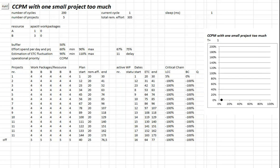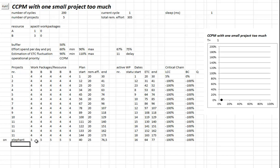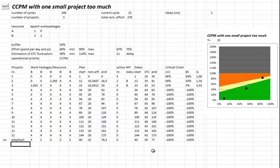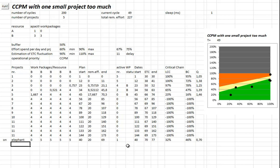Now what happens if I turn the elephant on? It's slightly bigger. The resources are not enough for everyone, so they have to be shared. That means not just the elephant has a problem but all other projects too. Here you see when it's getting red, the elephant is occurring. Now it's active, and you see immediately how not just the elephant but also other projects are getting worse.